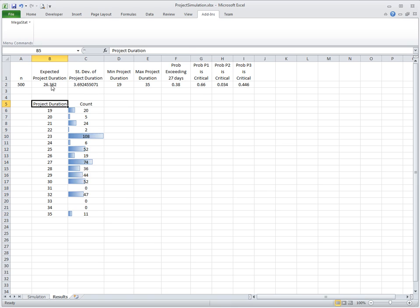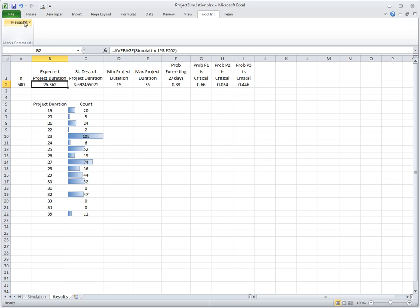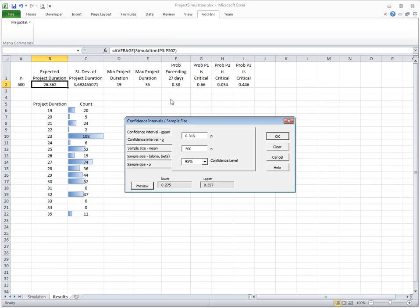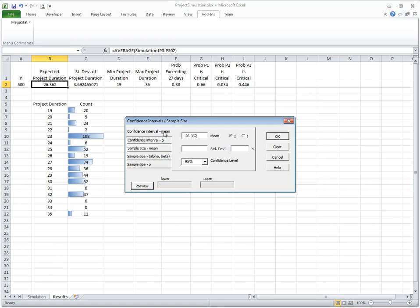What's the actual expected project duration? This is just out of 500 experiments, but if we think about the whole population of all possible experiments, what's the expected value of project duration? We can compute a 95% confidence interval by entering the actual mean 26.362, the standard deviation 3.692, and the number of experiments was 500.